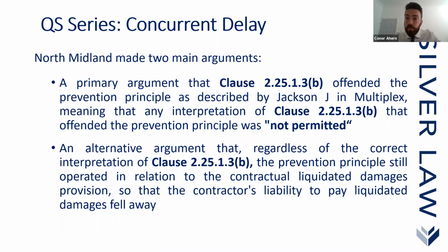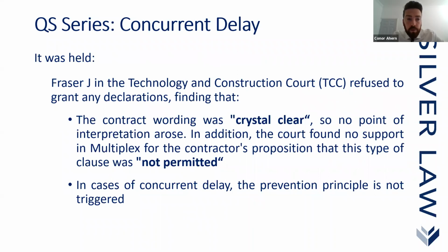The amendment was clearly agreed by them in the schedule of amendments, but now they're trying to rely on the prevention principle to say that where the employer has caused delay to us, we should be entitled to an extension of time, and obviously that will keep the liquidated damages at bay. So there you can see the primary and secondary arguments which were dealt with by Justice Fraser in the TCC.